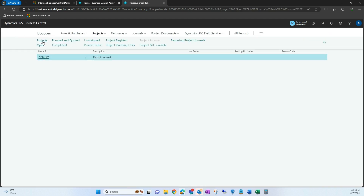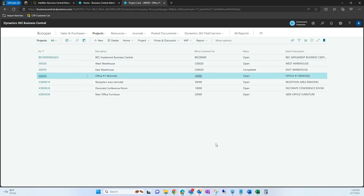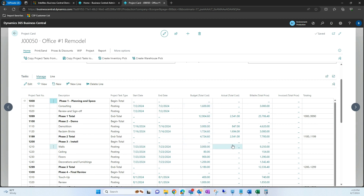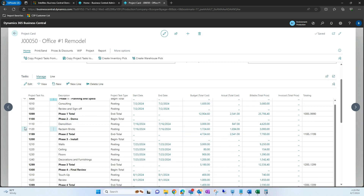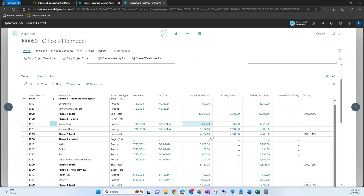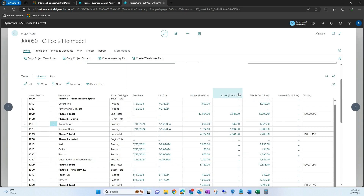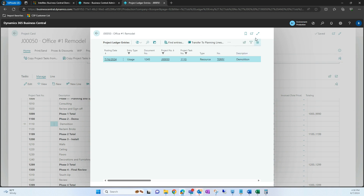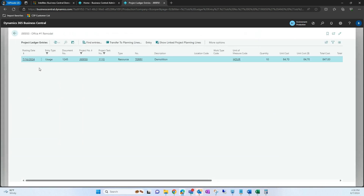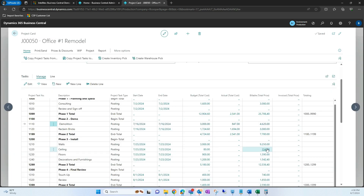Now I'm going to navigate back to that project to show you how the budget versus actual looks. Under demolition and reclaimed bricks, we have our budgeted amount of 3,000 and the reclaimed bricks amount — this is what we specified as expected to bill for this task. Under actual cost, this is what we have posted for the time Terry actually spent on this project task. That's an overview of how to process timesheets and how to view them on the project card.